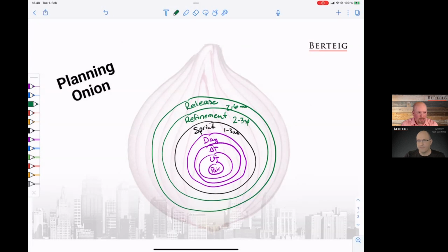If we have more sort of predictability in an environment, whatever we think of that, but we have a lot of existing things, there are dependencies, and release level is where we deal with many of the larger scale dependencies, not technical, small scale, but like when do we use or start doing some new product areas or expand to new areas, like business process dependencies, or financial dependencies, or you mentioned earlier regulatory things, for example. So release level is that.